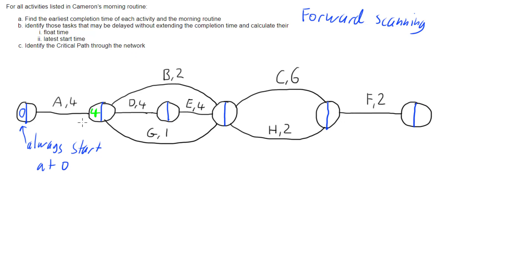Now we look through to the next node. This next node is operating off of D, which is working off of that four. Activity D can't start until this node has been reached, so it can't start until four minutes in. But it takes four minutes, so it will finish eight minutes in.